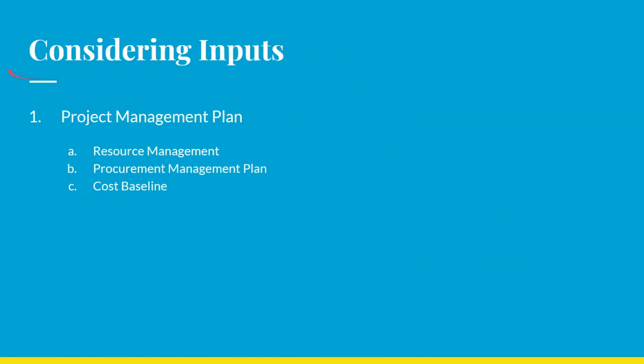And we should consider the inputs, and the first one is the project management plan, that including the resource management plan, procurement management plan, and cost baseline. The resource management plan includes the guidance on how to acquire team and physical resources on the project.